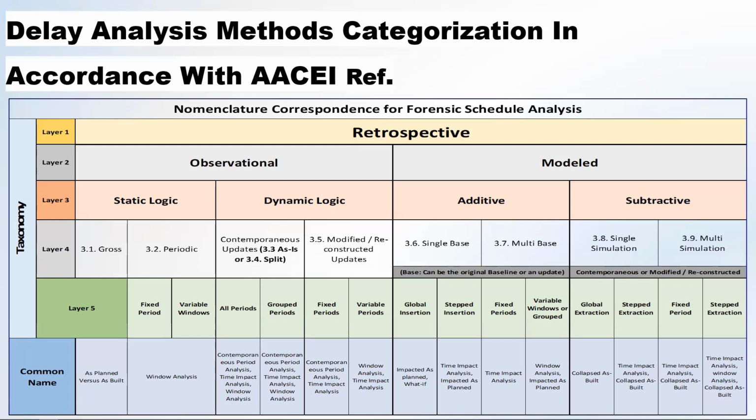In the additive, I will do it like this. I will just create the fragment and put it in and see the impact. In the subtractive, I'm going to forget about the baseline. I'm going to forget about the update, and I'm going to establish a new schedule containing the excavation with the actual duration, but with no actual progress in P6, with no 100 percent complete in P6.